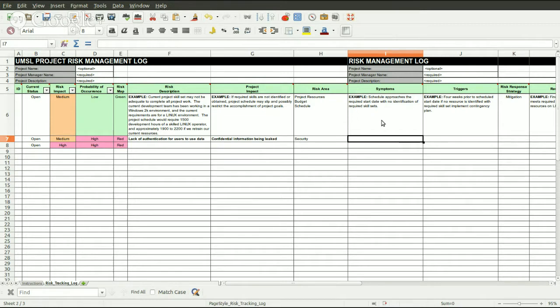So you get to that point where you say in your schedule, okay, well, we know we need this particular item done, right? We need this particular item designed, and person X hasn't designed it yet, and it's 3 weeks before the project is due. Hopefully, it's way before then. You say, all right, we need to immediately put someone else on this task, or the person needs help. Maybe their schedule is really behind, and maybe the trigger is you ask me to write a letter to your boss to say that, hey, you can't really work this weekend. You have some type of critical task, or we see that we can get you some additional help, or that I help out as well.